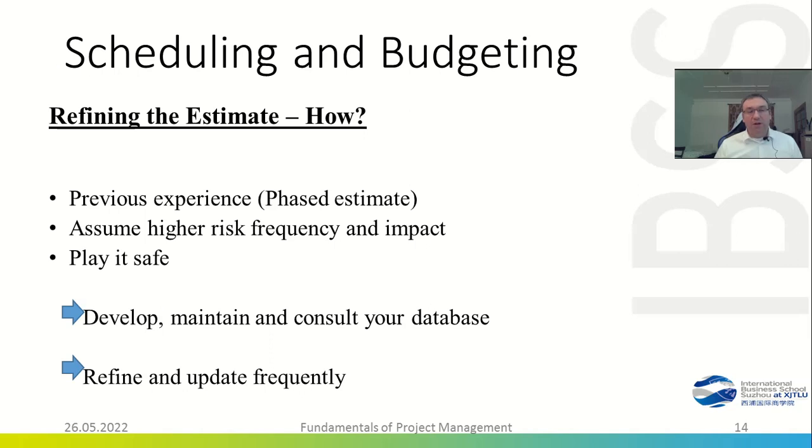Essentially, what we are doing at the project management office, we look at our database of information of how our previous projects went, and we try to refine and update the plan of the project, the baseline, as frequently as possible.